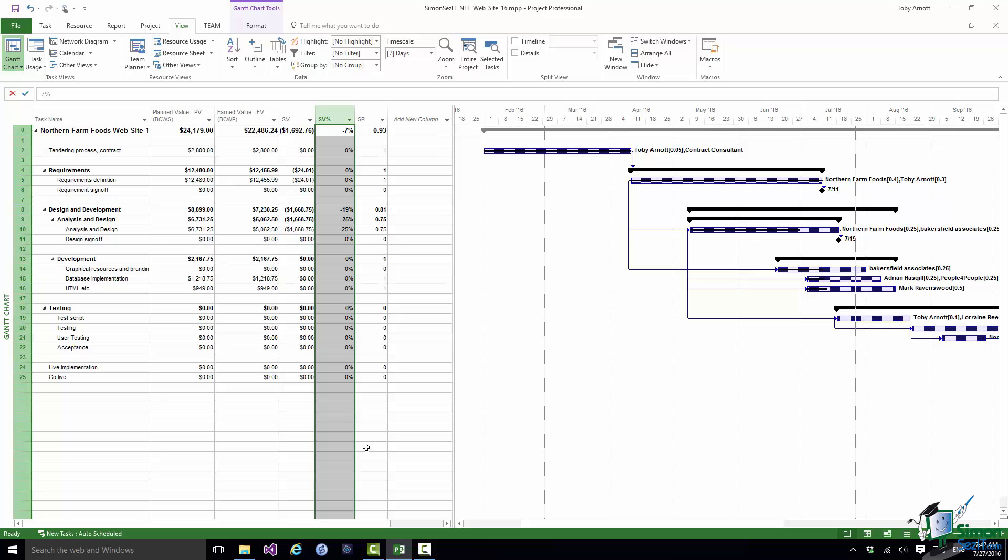Again the same rule applies as with CPI. You're looking for values of one for tasks that have started or indeed have completed. So they're all of the key indicators. In the next section we're going to look at an example of earned value analysis and reporting. So I'll see you then.